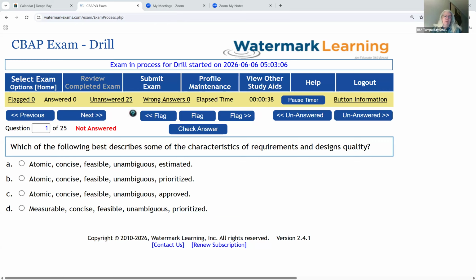In that, we are going to talk about what the benefits are, what the costs are, we're going to determine the value, and this is potential value, which is a big deal in the BABOK. And then we're going to assess the design options and recommend the solution. We're going to talk about available resources. Do we have the developer that has the skills on board, or do we need to train somebody or bring somebody on? Do we have the workforce that is capable of understanding the technology, or do we need to create training, or is that going to be a burden for us? We'll talk about constraints on the solution and dependencies between requirements.